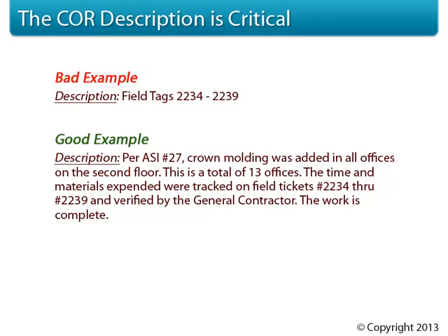This may not sound like a big deal when field tags are concerned, since the actual time and materials are being verified on a daily basis, but the fact is that owners like to pay for issues all at once, not in pieces. And most general contractors won't even submit a change order request to the owner until all costs have been attained. If an owner gets a second change order request for this same work, the first question he's going to ask is, "Didn't I already pay for this?"